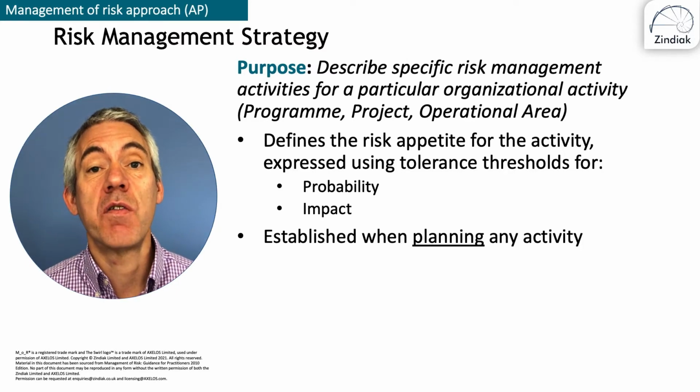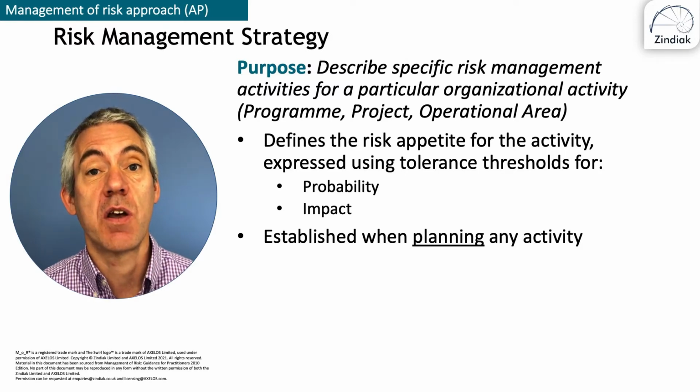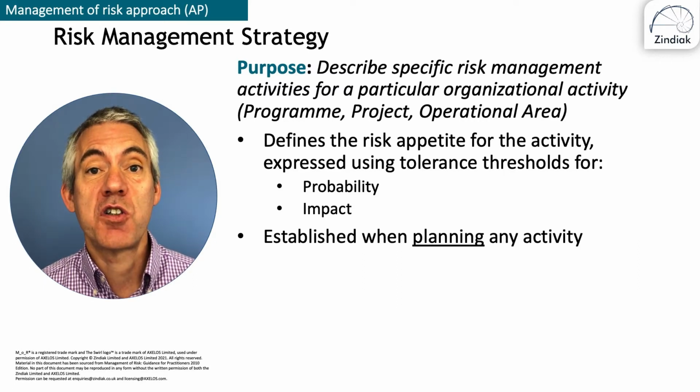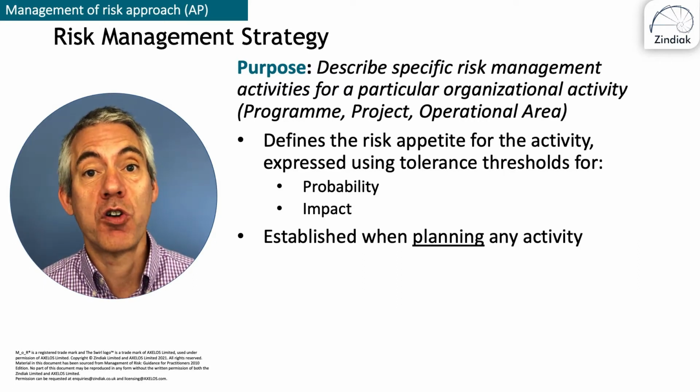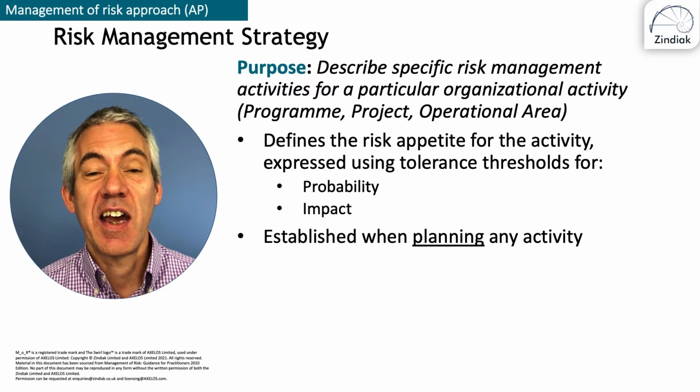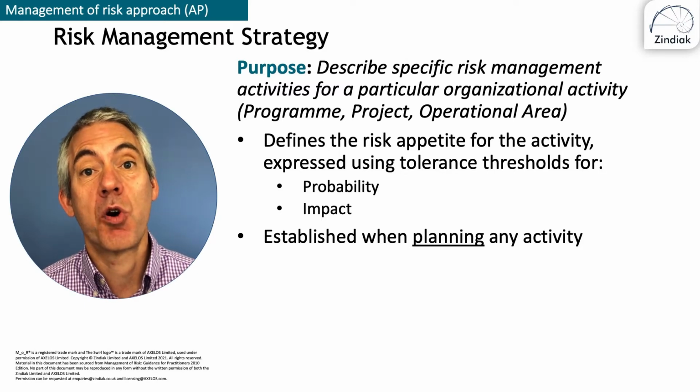It's important that the risk management strategy is established when planning any activity. So if you're following PRINCE2, the risk management strategy for the project will be created during the initiation phase, during the initiating a project process.